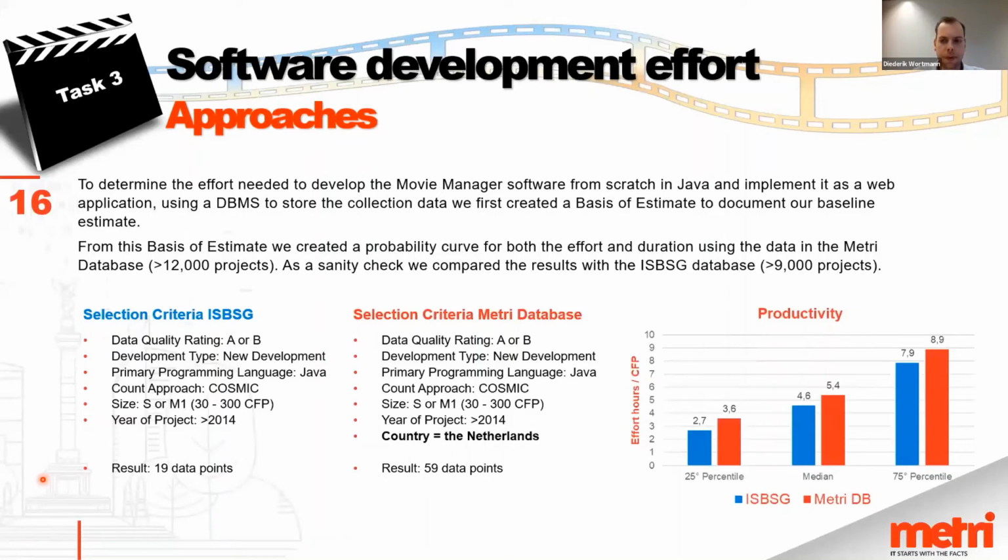To determine the effort required to develop the requested piece of software, we use benchmarking data sets to provide us with reference data of similar projects, of course, already mentioned by a few other panelists today. In our case, we had 2 suitable databases available to us: the ISBSG dataset, probably familiar to most people here, and our proprietary Metri database.